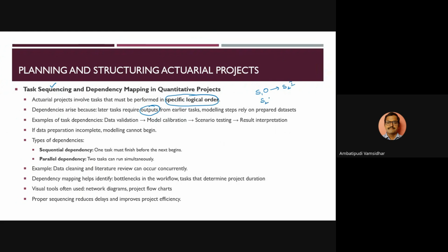The outputs of step 2 might become the inputs of step 3, which means there could be a lot of task-related dependencies. Let's say you work with data validation. The data validation will in turn lead to model calibration, which should again lead to scenario testing and then to interpreting the result. If the overall data preparation is incomplete, then the modeling itself cannot start. That itself is a major dependency.